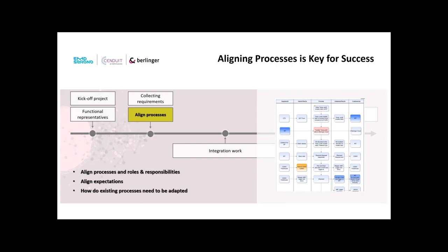But what is important there is that the different technologies also impose different types of processes. USB still requires some manual handling. Obviously, you have to transfer the data. Wireless technology requires less manual intervention, so to say. So these impose different types of processes to be implemented. So that's an interesting result.